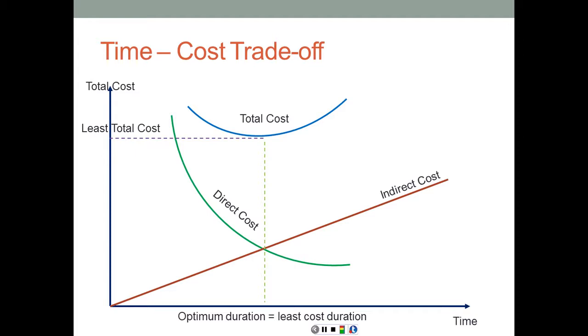Always keep an eye on the near critical activities, which have a very low amount of total float, because once you start compressing, you may cause these activities to become critical, and therefore create additional critical paths, which is going to require parallel compression of these paths.